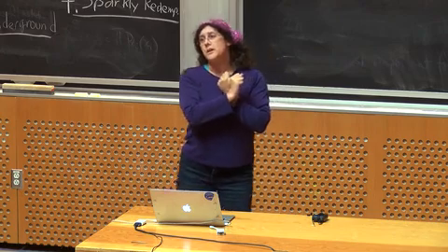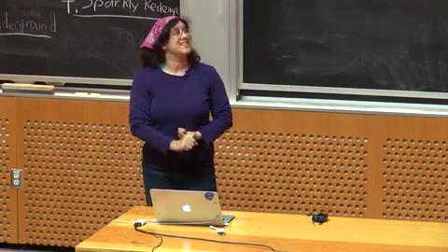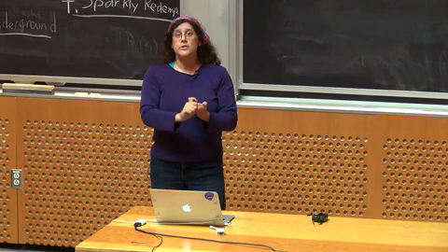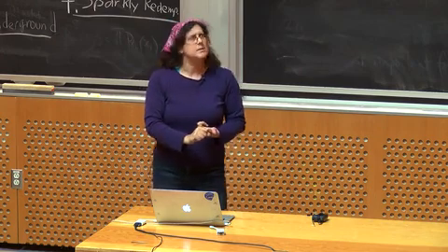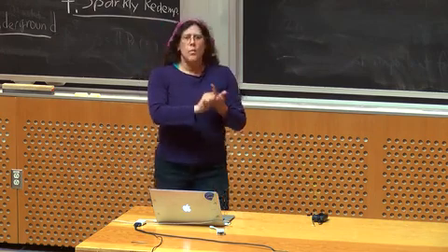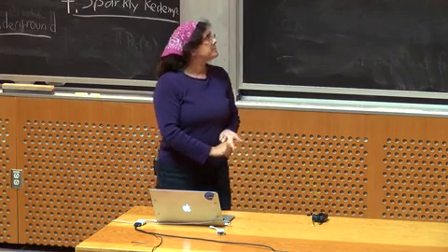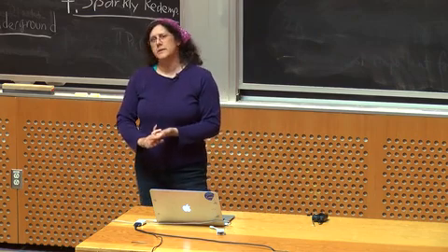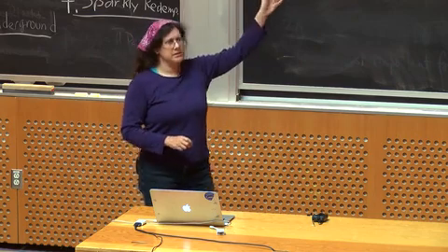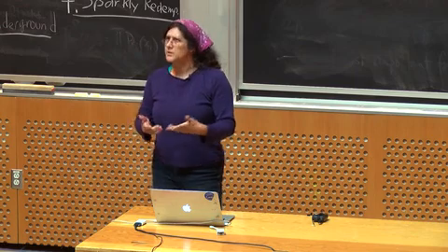What did you do yesterday or since our last meeting? So what have you gotten done? What are you going to do today? What's on your task list? And finally, what is keeping you from getting things done? What's blocking you? How come you can't get things done? And sometimes the answer is nothing, and sometimes the answer is something, in which case it needs to get dealt with.